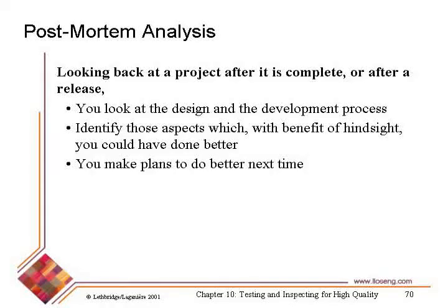Another quality assurance technique is postmortem analysis. It has a relationship to root cause analysis. Root cause analysis is typically looking at a particular defect or failure. Postmortem analysis is saying, when you finish, when you release the project, let's go back and look at what we did. What did we do well at? If we had panics, why did we panic about things? What went wrong? And what did we do well? What can we do again next time effectively?